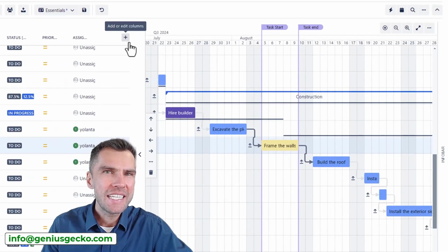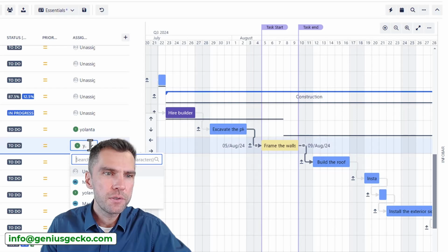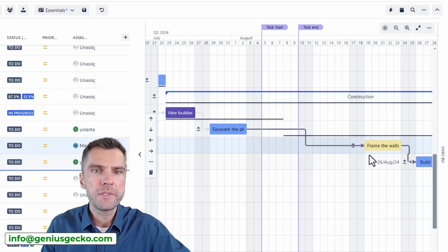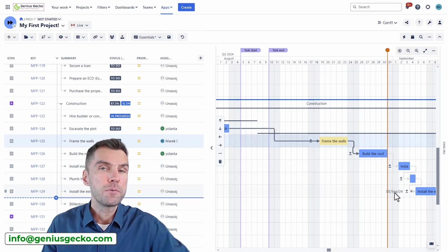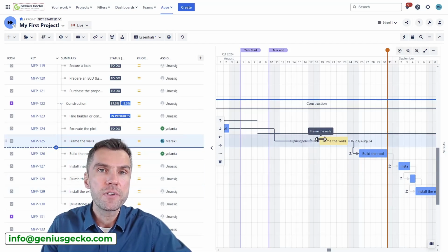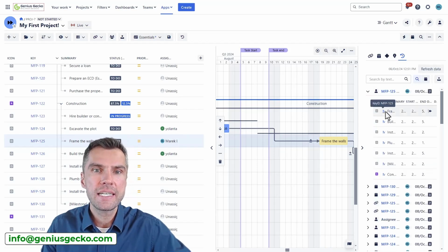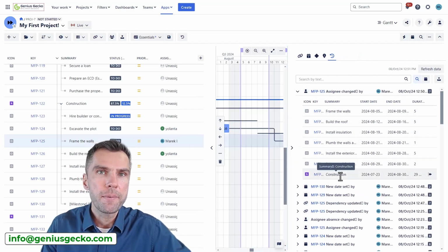Now in the meantime, I reassigned the tasks so they are not assigned to a user that will actually be absent. Now if we try to assign it to a person that is on absence leave, you will see that the items right here will be rescheduled accordingly. This basically means that all the linked issues, since we are using auto scheduling mode and they are not resolved or completed, not in the done status, will be automatically pushed so that they start on the first working day. And if we look at the change history, you will see that this reassignee action actually triggered an update of all these linked issues, including the parent.